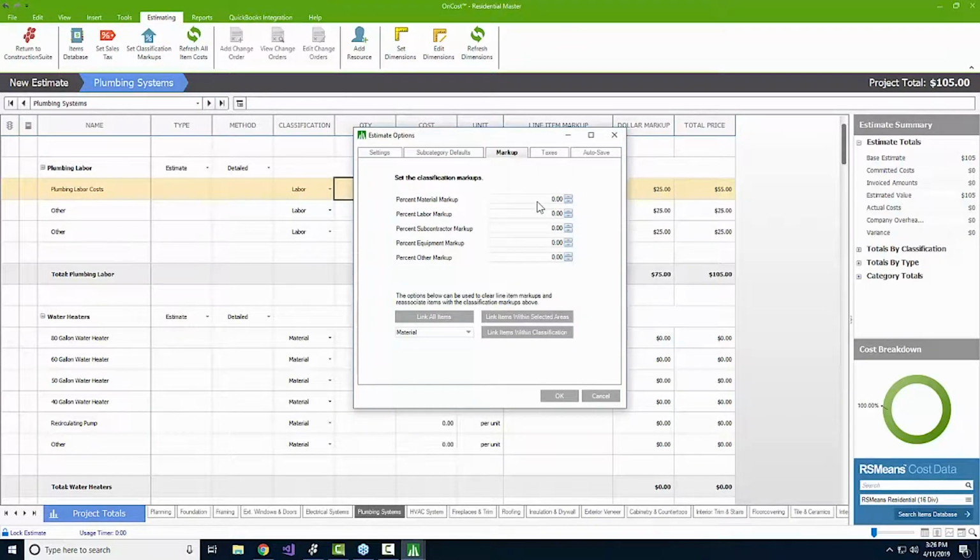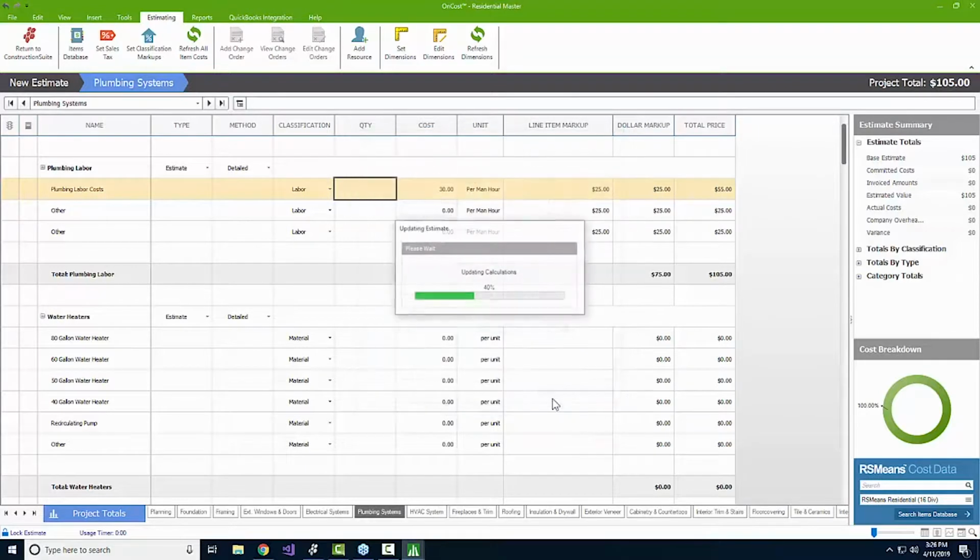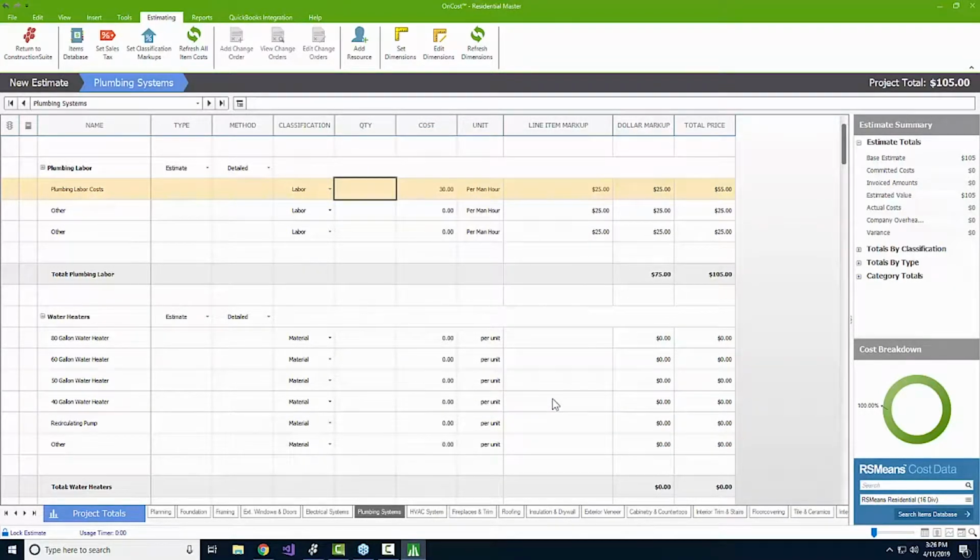labor. This is something you don't find in most of the Excel-based estimates. But we do this just as a default. We know that this is important. We have to get in there and apply this additional markup. And this is for all labor items, everything that we put in for our man hours. Maybe that's going to be an extra 80% on top of what we pay the guy or our teams, whoever they may be. That just goes through and globally applies these things for all of labor.